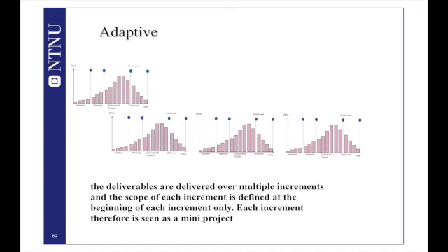It also provides the opportunity to make a series of evaluations at the end of each mini project. So you don't wait 2 years to evaluate. So it's a lot of flexibility. The adaptive approach is the flexible approach.